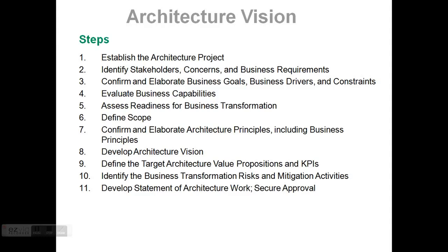Then activities will involve identifying new work products that will need to be changed, providing direction on which existing work products, including building blocks, will need to be changed, and ensuring that all activities and dependencies on these are coordinated together. Identifying the impact of change on other work products and dependencies on their activities is important.